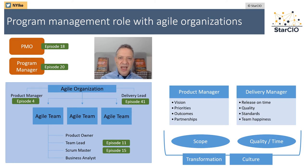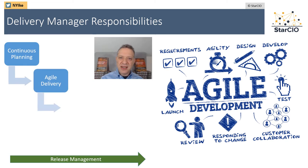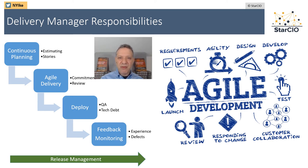The Agile process — through collaboration around teamwork, culture, and principles — aims to transform and plan so that these two individuals and their teams can work on delivering a great product, platform, or program while also hitting dates, quality, and standards. Now let's dive deeper into the role of the Agile Delivery Manager. When I think about this role, I start with the perspective of releases: how do multiple teams coordinate on delivering a quality release, whether you're working on products, platforms, or programs. In the STAR CIO Agile planning programs, we take features through a process of planning every sprint, estimating, writing stories, going into delivery mode, deploying through testing and deployment automations, and managing feedback. The delivery manager works with team leads, Scrum Masters, and their teams to execute this process.